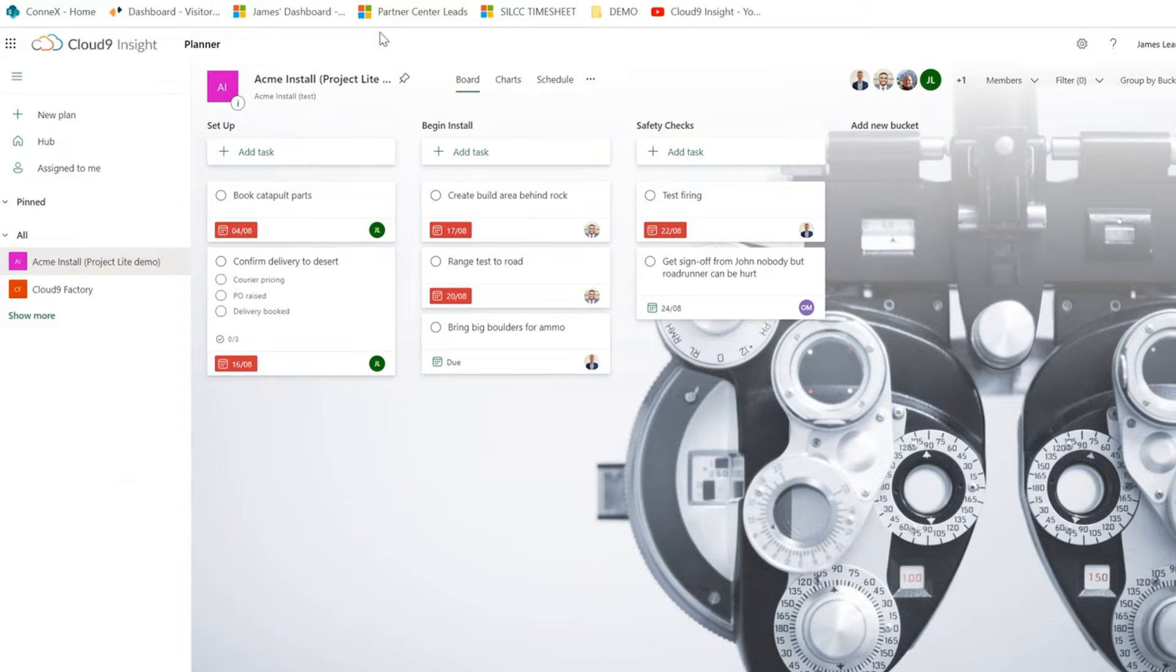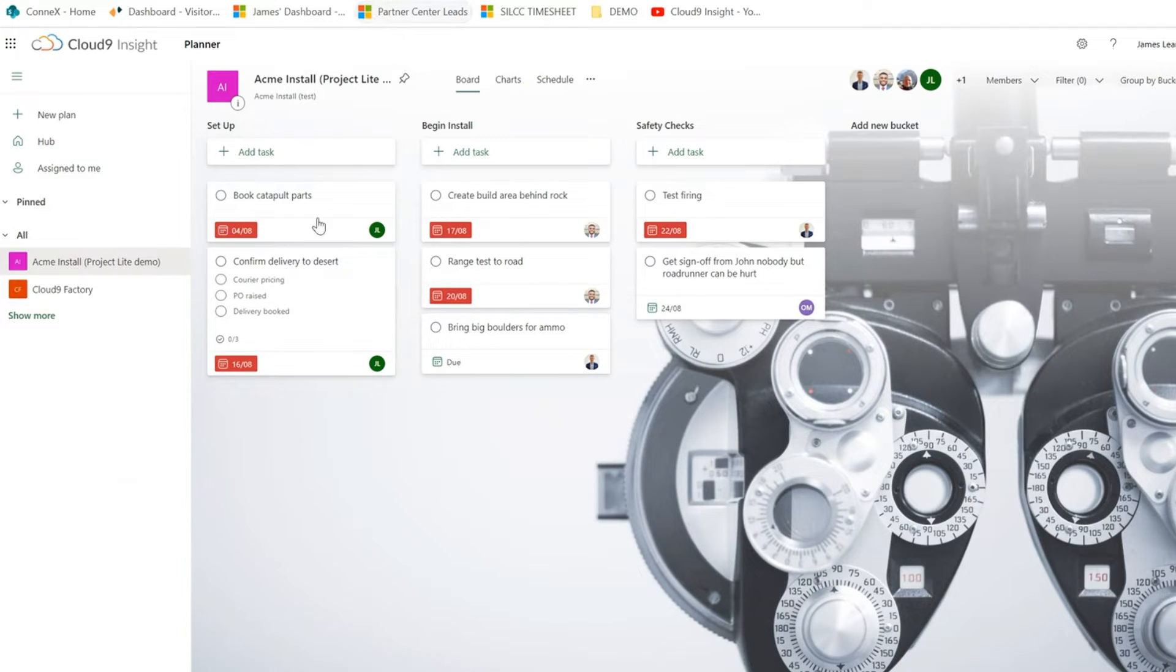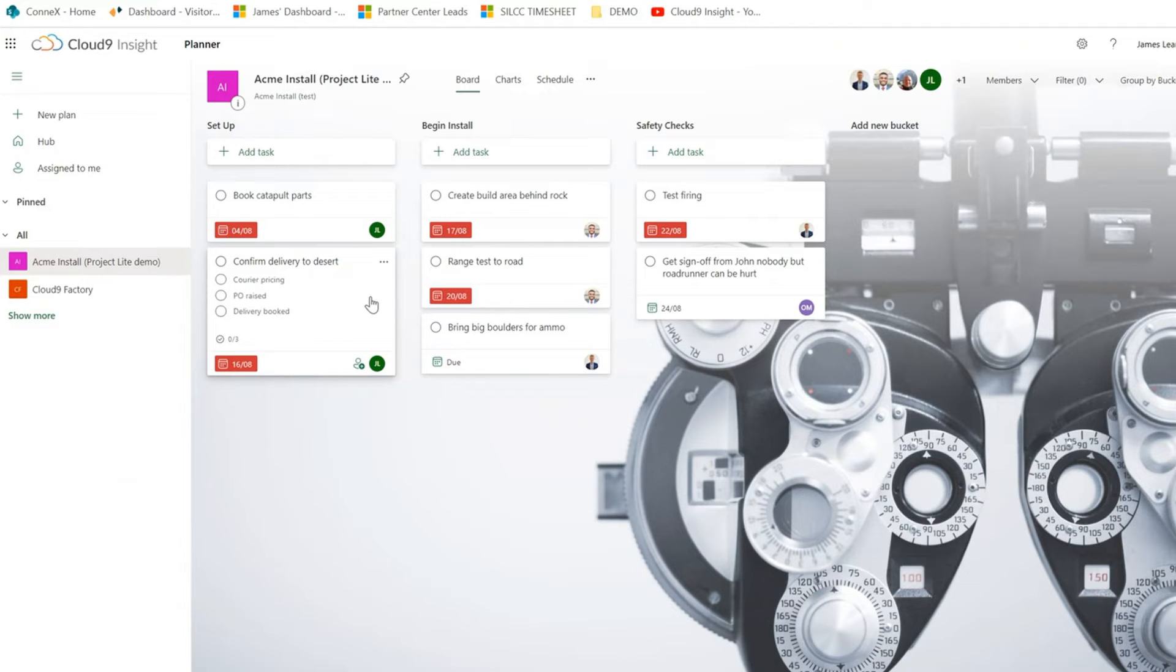Here, within the Planner, we can see our deliverables. These deliverables are called buckets. Within the buckets, we have tasks. These tasks have to be completed to complete the bucket. And within the task, we have a checklist. We have to complete that checklist to fulfill that task.